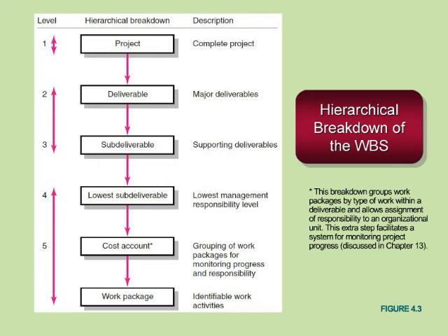So we can actually have a management structure for that work that's going to be done and specifically identify who or what needs to be done within that lowest level management responsibility structure. So getting down to the work package, maybe it's running a test on a circuit board, or maybe it's writing a marketing piece for a bigger marketing project.